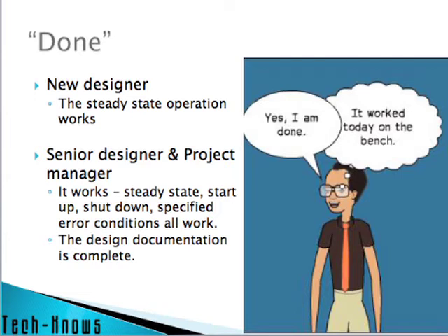It works means the steady state works, the starting conditions work, the shutdown works, the error conditions work. You can update the code and it still works at the right time after you've done that. And the design documentation is complete. Focused on the design, but a more complete state of affairs.